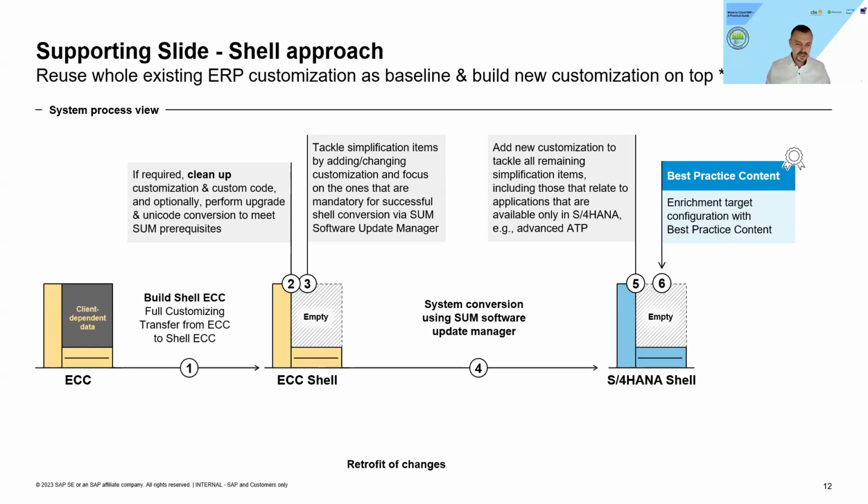One thing in addition is that the update or the full conversion of this shell is much simpler and faster, since we are not talking about a full conversion of the whole application data. So for this shell, we have the chance to do it not as part of a downtime, doing it upfront and step by step in detail on a non-time-sensitive path, let's say.